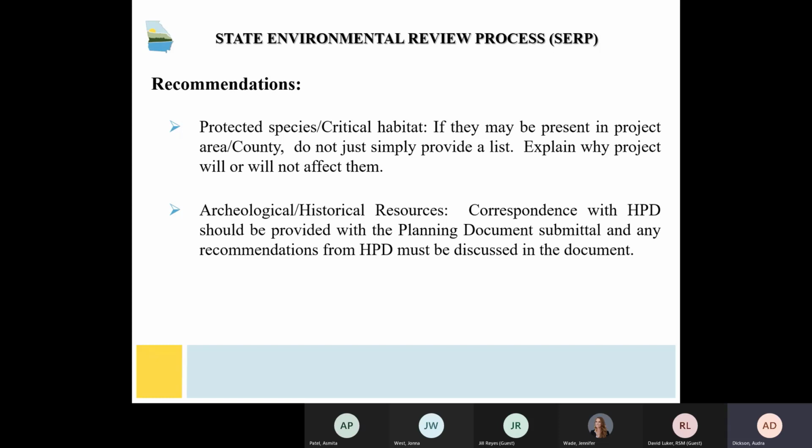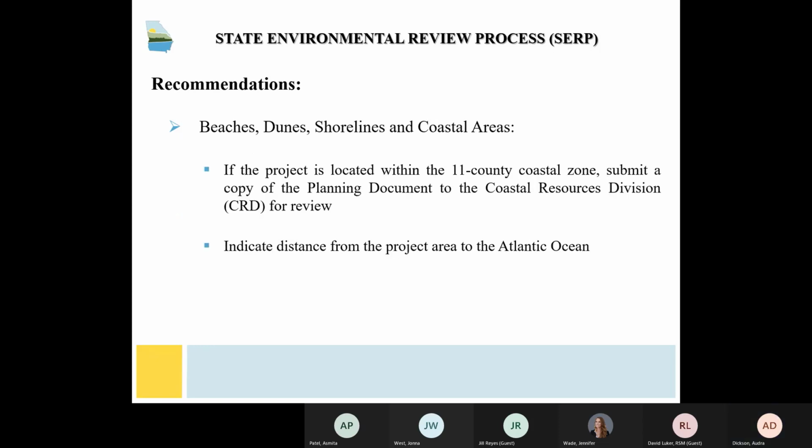Typically for a non-ZEAS, HPD requires a phase 1 archaeological survey, and HPD recommendations must be discussed in the planning document. For projects that impact beaches, dunes, shorelines, and coastal areas, a project description or planning document needs to be submitted to the Coastal Resources Division, along with the distance from the project area to the Atlantic Ocean.